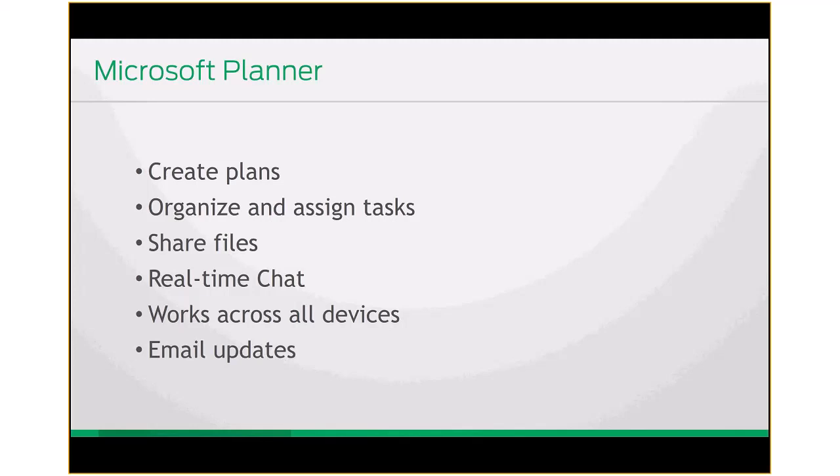We will use Microsoft Project for managing complex projects with lots of assignments, with dates, with a lot of schedule dependencies, things like that, and we roll all of our project plans up into our portfolio reporting tool in Microsoft Project Online. And that's very helpful for that. We can also do timesheets and other things, very capable, very robust, and somewhat complex.